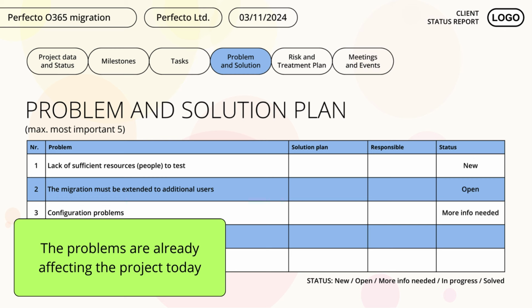If we already have a proposal for the solution plan, we can discuss it with the client at the status meeting or suggest a separate meeting on this topic. Often we only get this far with the status. We request a meeting and identify the participants. Always assign a responsible person to the solution plan. It is not the best solution to put the client's name or the project manager's name next to everything.